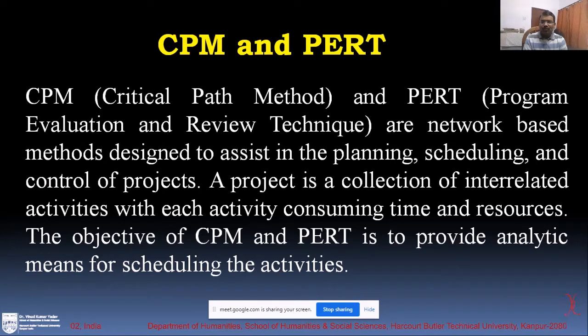So you will say that prototyping may take a maximum of 3 months, and a minimum of 1 month, the best possible time, and the optimum time. So you use the PERT method to schedule the activities of this prototyping, because it is a non-repetitive type of job.